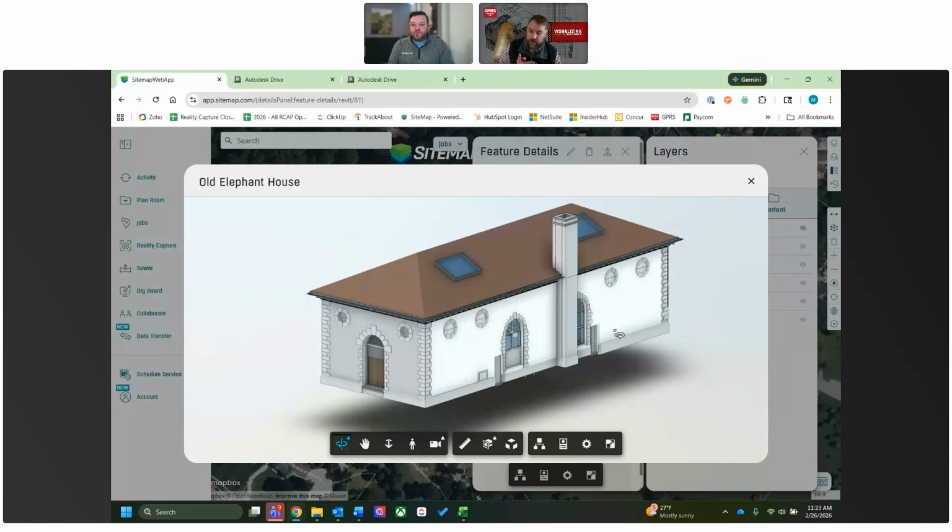We have a 3-day queue with our registration team, which we can sometimes work on if something needs to be expedited. But that's just the time to get through the process. Usually it only takes about a half day or less to actually register it, but 3 days to get through that queue. And then once we have the point cloud ready to model, off of that 1 day of capture, it's usually about 10 days to reproduce a Revit file like you see here, along with the plan data and such.